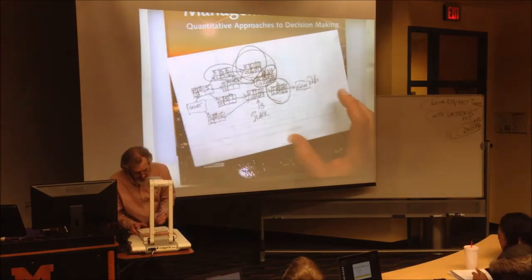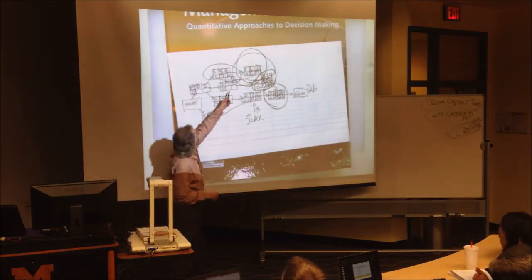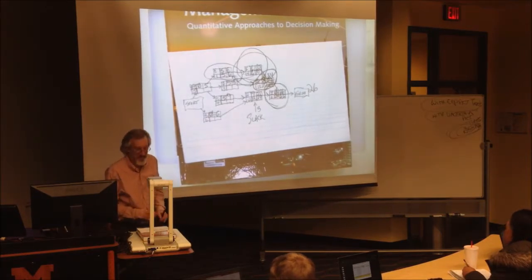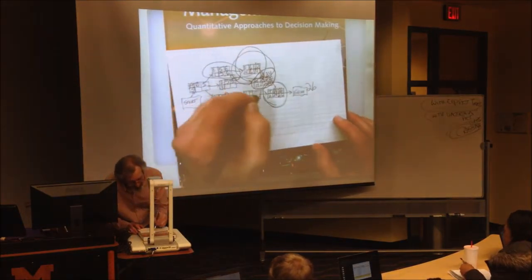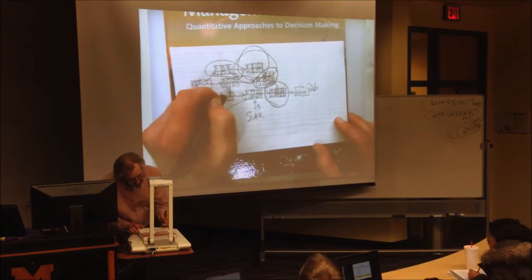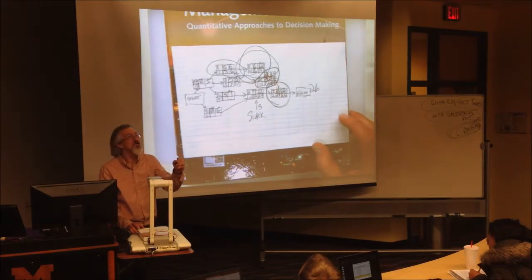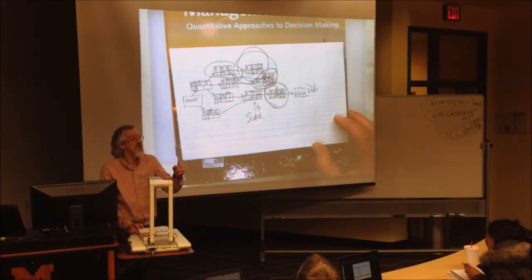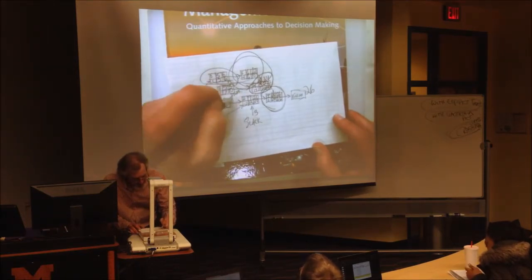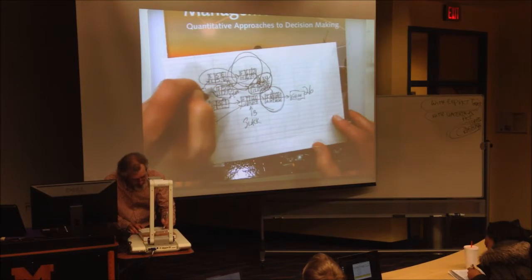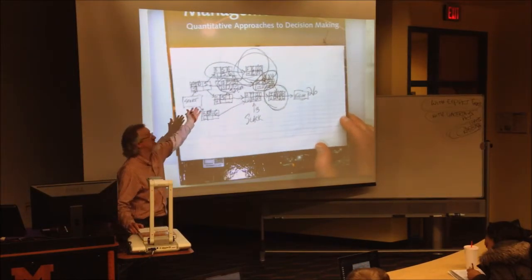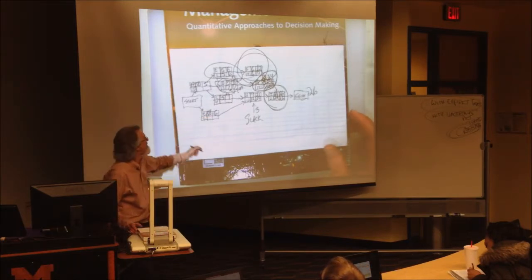Critical activity. D, what's the latest start right here for D? What's after D? There's so many lines up there, it's hard to tell. 10, because G is after it, and the latest finish for G is a 10. So that's a 10. Subtract 3. We're at 7. Critical? Slack? How much? 2 days. I'm going to put a 2 slack right there, so I know that one has 2 days slack. I don't have to sweat over it. I just want to see if they make it on day 5 or not, then I start plugging them.